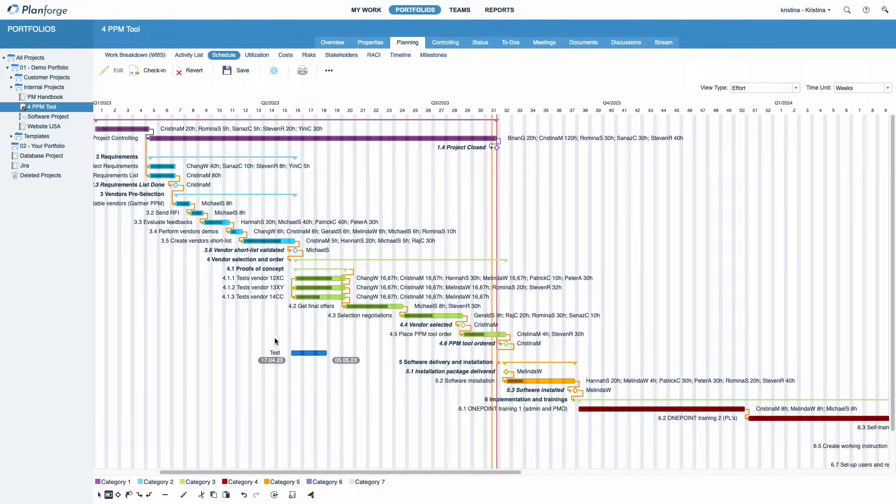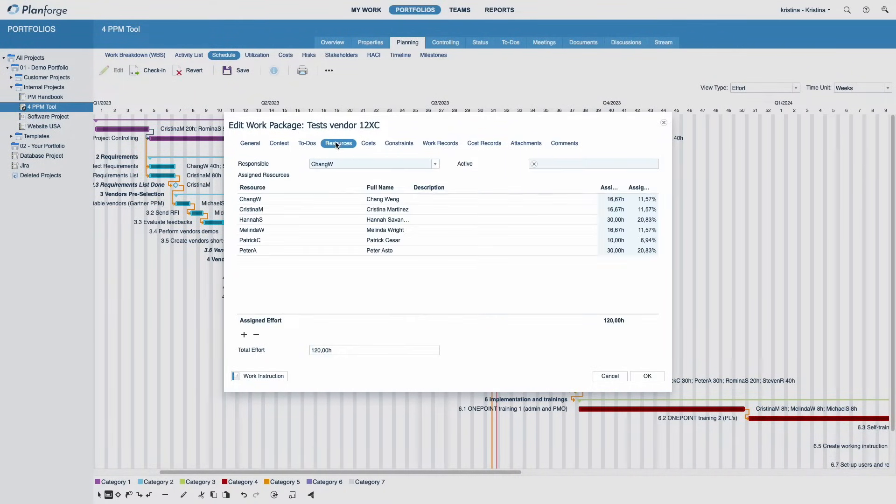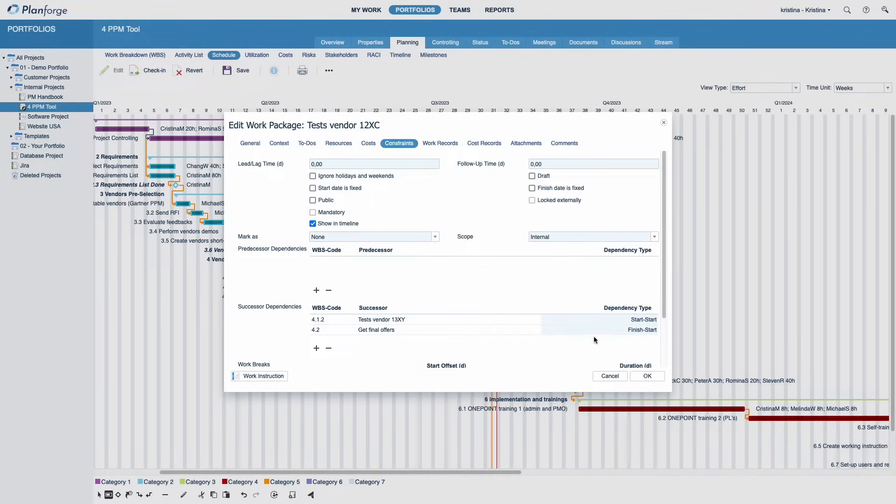Double-click an activity or milestone to edit the activity's details. Add additional information such as lead and follow-up times or edit resources, costs, and more.